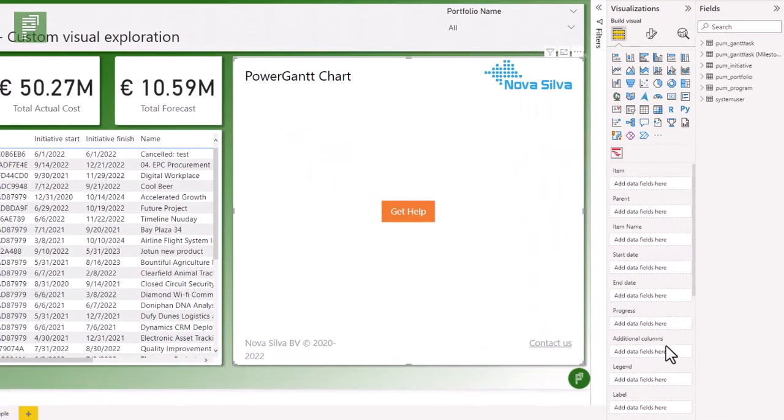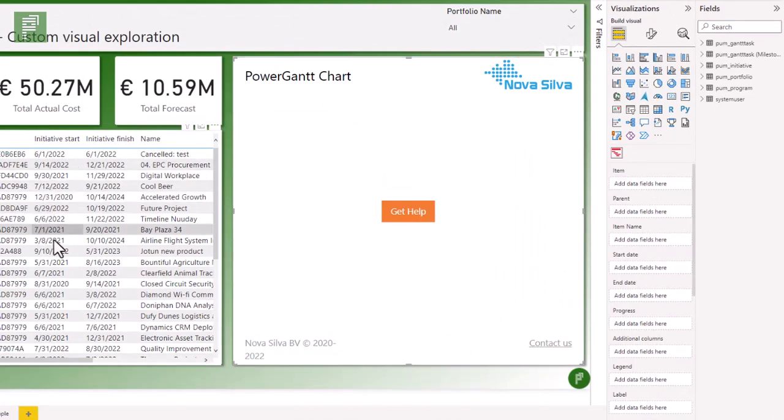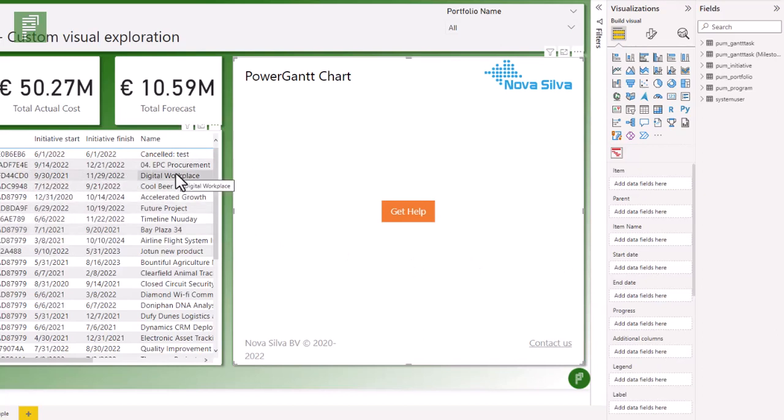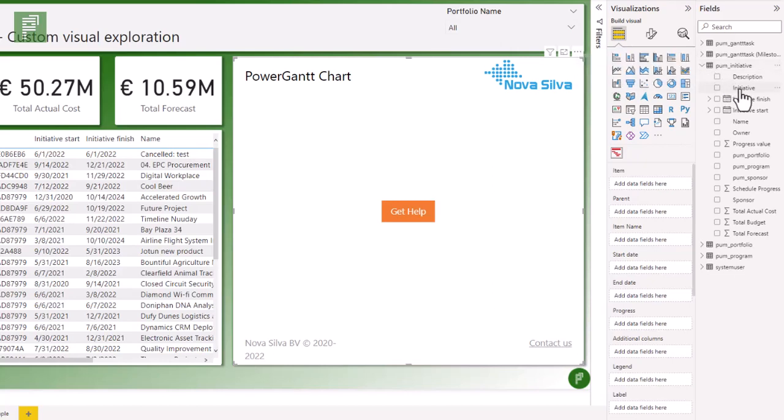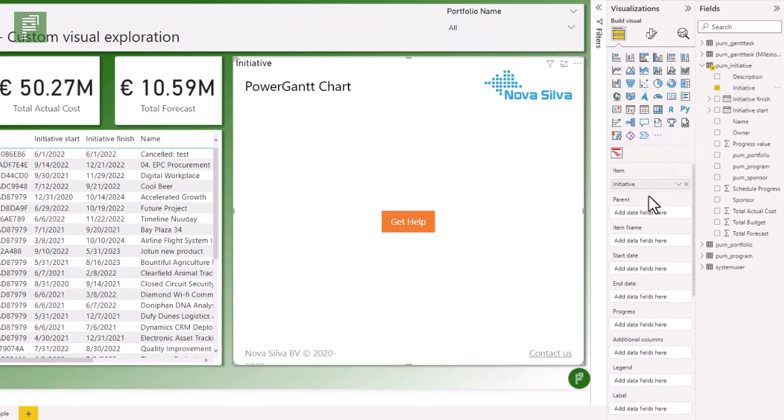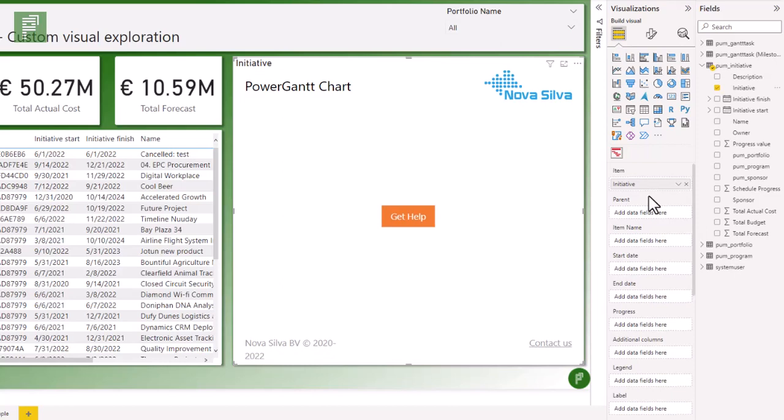On this page we'll have a project overview of the information that we're seeing on the left side. So we have an initiative UID, we have a start, we have a finish and we have a name. So how would we populate that in the Power Gantt chart? Let's navigate to our pump initiative and let's populate the UID into the item value. Now for the item value you need to have a unique value that is equal across everywhere within your data set. So make sure that that is a number or a global unique ID, anything like that will work.